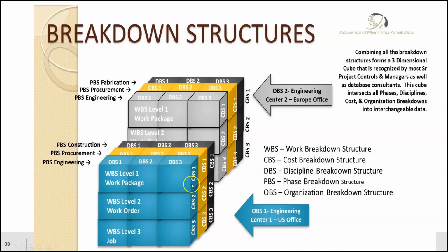This cost coding has a tag number on every area, every discipline, and every phase, so that when money is spent, that money is allocated to that code, if you will, and this code can then be reported on, tracked, and viewed, so they can see if certain phases, disciplines, or anything in that breakdown structure is providing a forecast of profit or loss, or bad productivity, good productivity. This is the concept, okay?